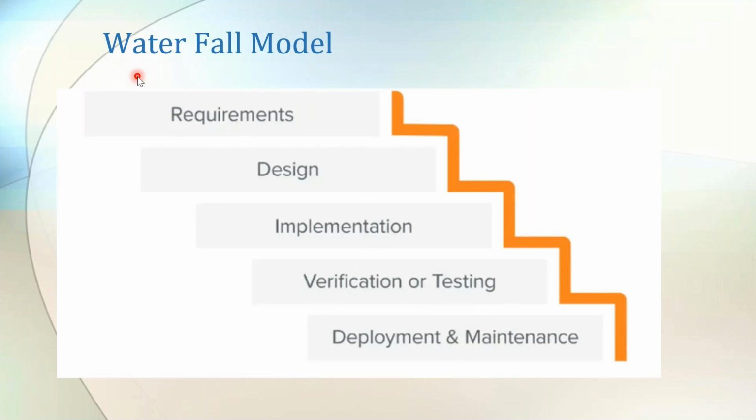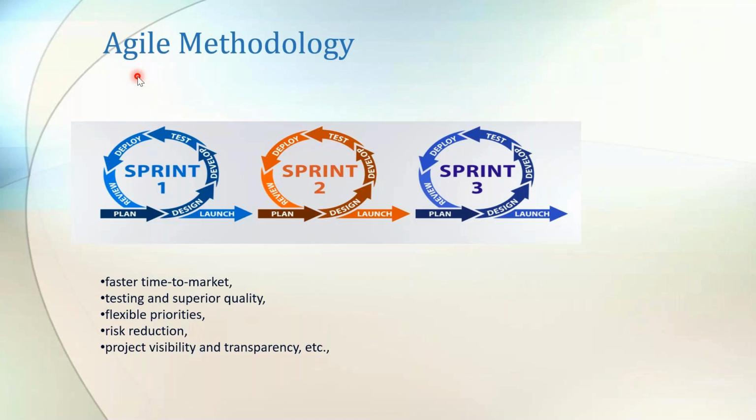So we approached a new model called agile methodology. Agile methodology is nothing but we were doing the same things, like requirement gathering, design, everything, but we are not doing it for 3 months or 6 months. We came into the model where we deliver things in a shorter time frame. So a 2 week sprint, 4 week sprint. We time framed everything. Within 2 weeks, I have to complete all the cycles.